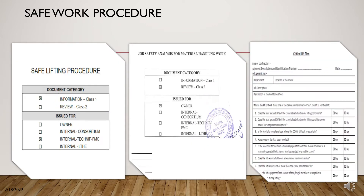Safe work procedures form one of the important parts of the engineering parameters of the Five E's of Safety. Under safe work procedures we have method statements or work procedures — documents prepared in advance to identify how a job should be executed in the safest manner. Job safety analysis identifies all risks and control measures. During execution, there should also be continuous inspection via checklists.